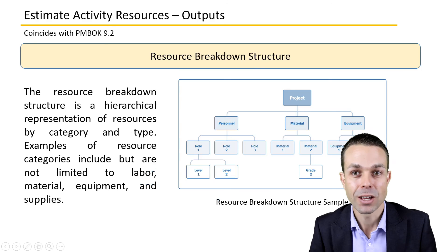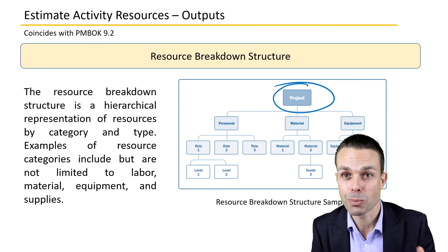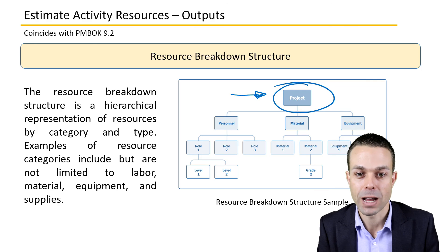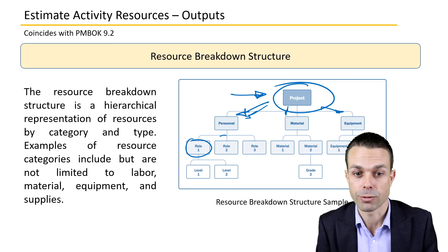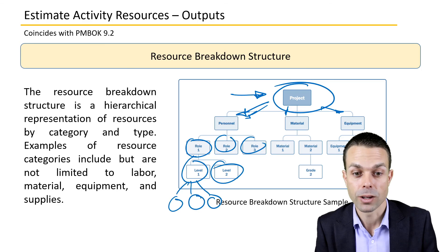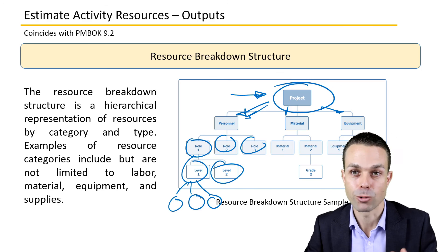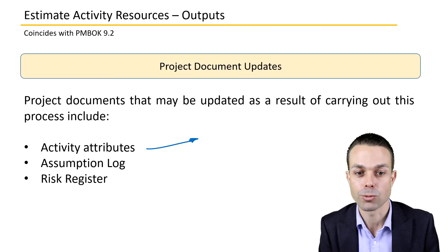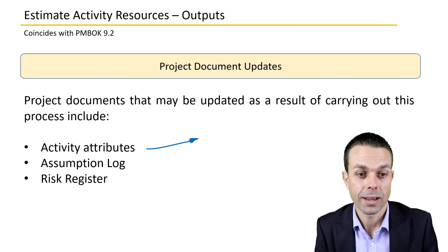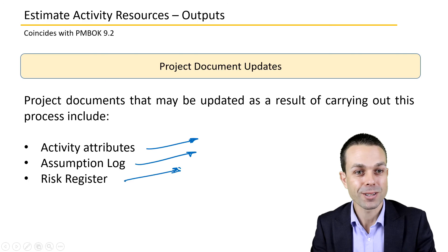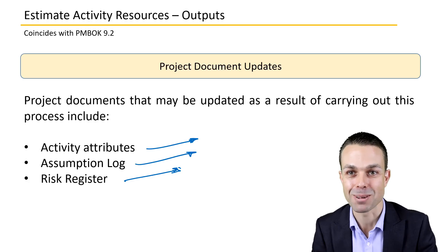The resource breakdown structure is also an output, similar to a work breakdown structure but decomposing resources — breaking down personnel and materials or equipment into roles and sub-roles. For example, a team leader may have a team beneath them, which may have further layers, until we reach the final layer of required resources. Project document updates include the activity attributes, the assumptions log, and any risk register updates. Those are all the details for estimating activity resources as part of the PMBOK.